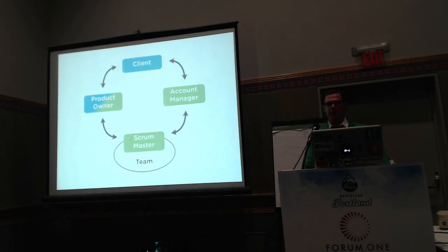You create fully dedicated teams. And fully dedicated teams work on multiple clients. And they work on only those clients, and only those clients are with only those teams. So you split your company into multiple companies. Now you have a 30-person shop. You have 3 person teams. And these 10 people are working on those 4 projects. And these 10 people are working on those 4 projects. And they are constantly working together. And usually you even seat them together so that they can have conversations and bounce ideas back and forth.